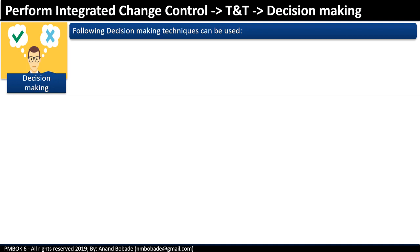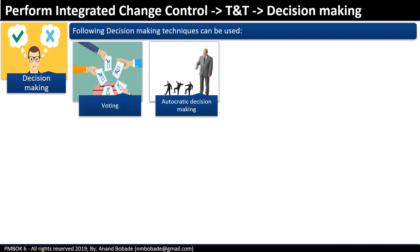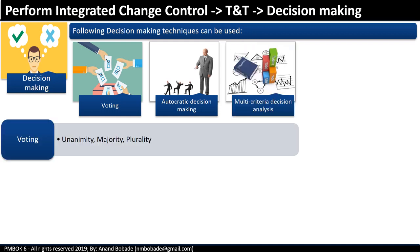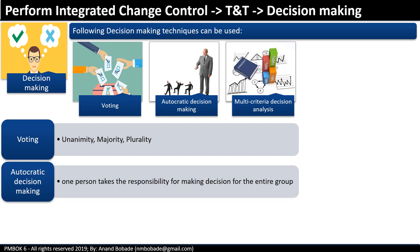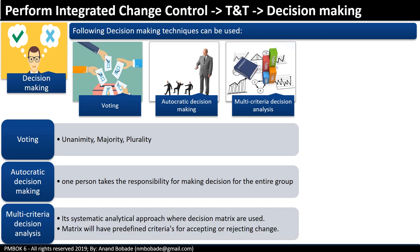Decision making techniques include voting, autocratic decision making, and multi-criteria decision analysis. A change request may go through voting, and a decision may be reached through unanimity, majority, or plurality. In some cases, the sponsor or chair of the CCB may override others and take a decision — this is autocratic decision making. Another way is a group represented by one person who gives consensus on behalf of the group. Multi-criteria decision analysis involves a systematic analytical approach where decision matrices with predefined criteria are used for accepting or rejecting changes.